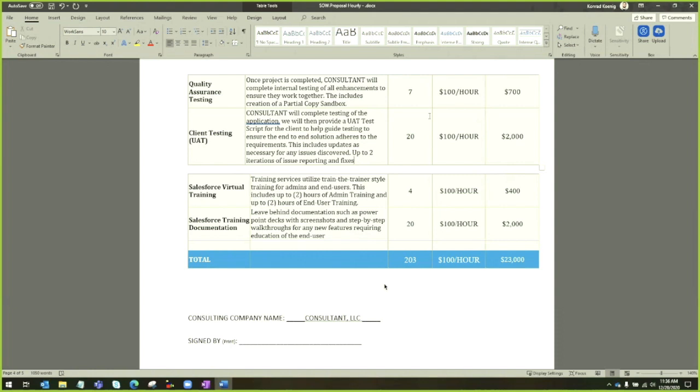So basically you've included ongoing support of the product in that. I would say that's probably a solid 5 hours of just support. Now putting the user acceptance test scripts together for everything that you've done above, that's probably 5 hours, and just conversation and stuff like that. So I might knock this down to maybe 10 or 12, something like that. And see how that feels. Yeah, I think that's fair.